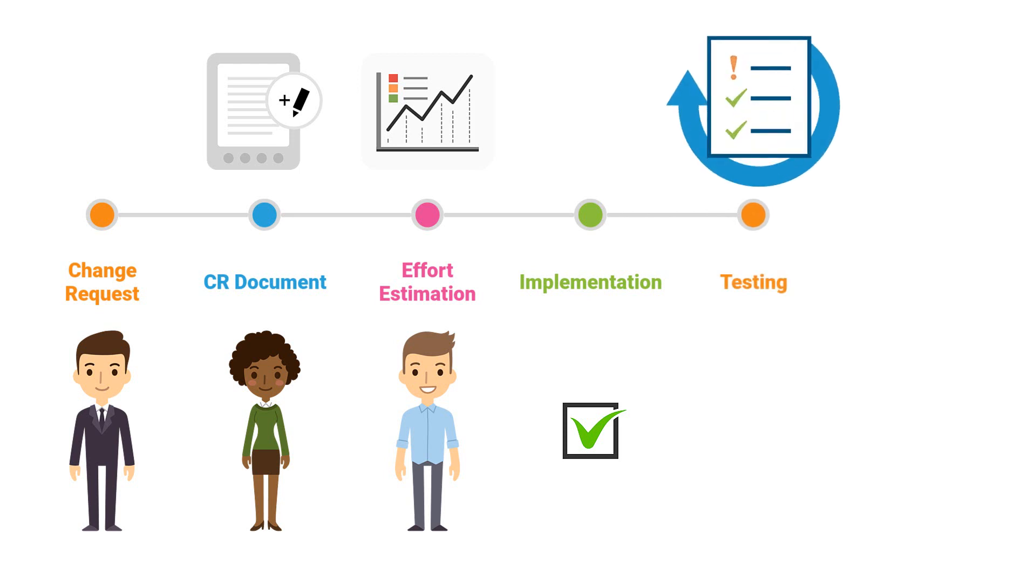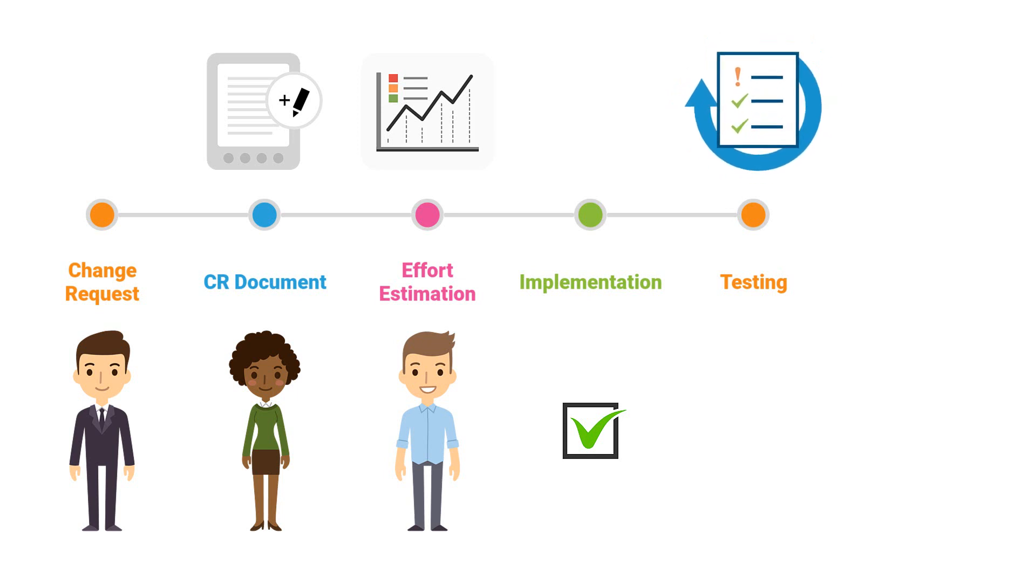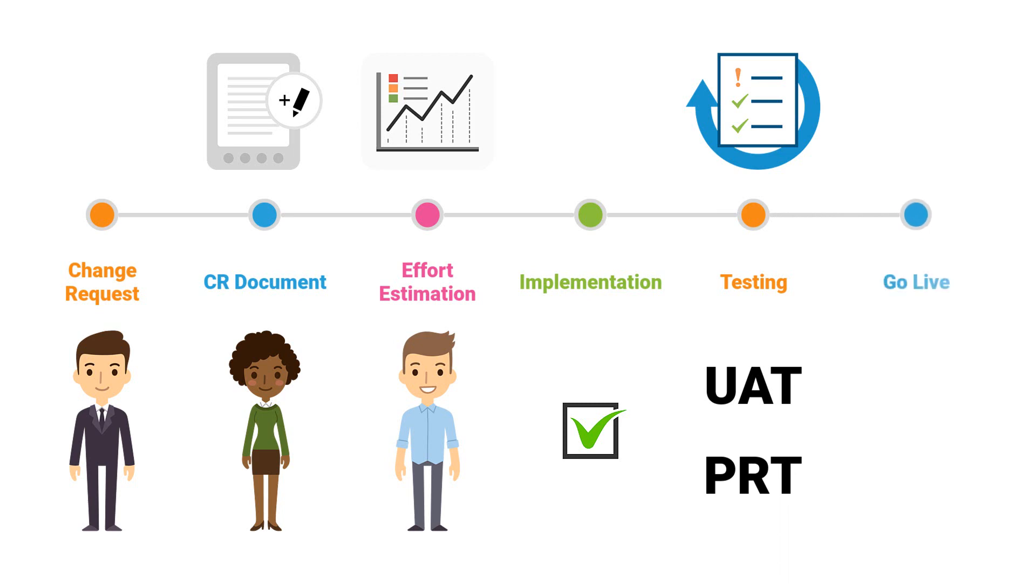Two tests should be performed: UAT and PRT. After successfully testing, the process can go live.